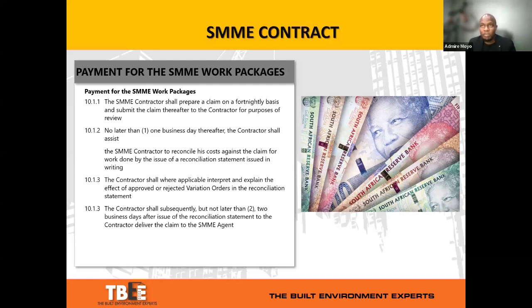When it comes to payment for SMME packages, we've recommended that the SMME contractor prepares a claim on a fortnightly basis. Again, most state institutions will tell you that they can only pay after 30 calendar days or 90 calendar days, or they can't guarantee when they'll pay and so on. But again, it's subject to change.